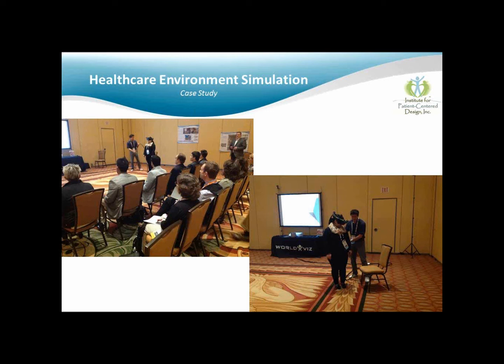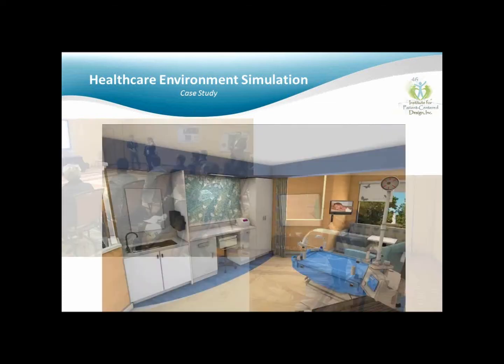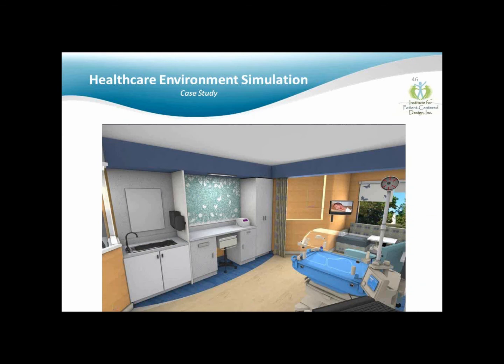The exception to that, of course, would be if for some reason you just have a very, very early stage BIM file with no materials or textures or anything like that, and you'd like a highly photorealistic model where we have to create textures and essentially provide design work similar to what an architect or other service provider would do, then it can get outside of that kind of 1 to 4, 1 to 5 day window.